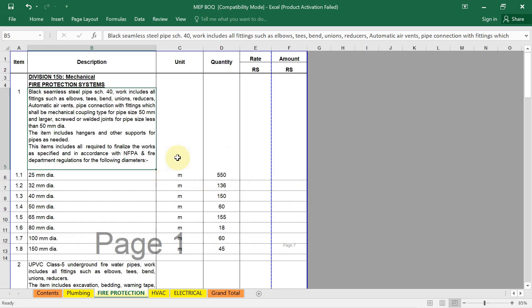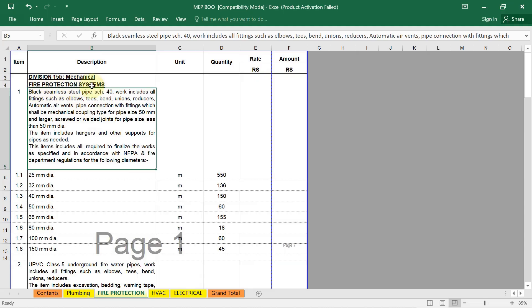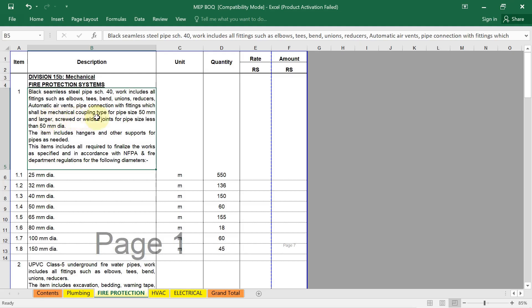You can see here in this BOQ document, the first one is description. As I already told you, in the description we have to provide a clear and detailed description of each item. For example, here in the fire protection system, you can see the fire pipe material. Detail description is written: black seamless steel pipe, schedule 40, work includes all fittings such as elbows, tees, bands, unions, reducers, automatic air vents, pipe connection with fittings which shall be mechanical coupling type for pipe size 50mm and larger, screwed or welded joint for pipe size less than 50mm. The detail is given here.